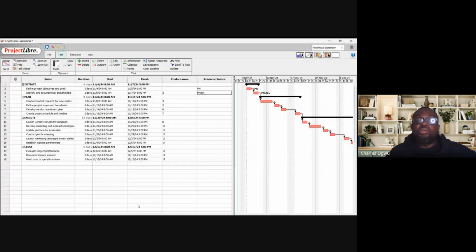Okay, the next thing is conduct market research, and conducting market research is BA. Conduct market research, I'll go over here, assign, I choose BA, and assign. That is how to assign. If you write something here, it's not going to happen. If, for instance, you just come and click and write BA, it's not going to work. That is not the process of assigning it.